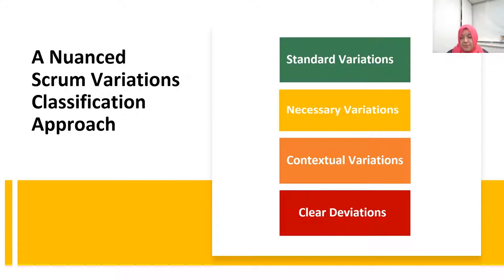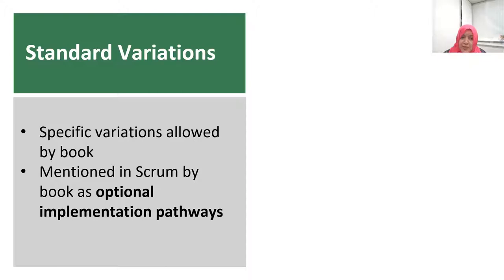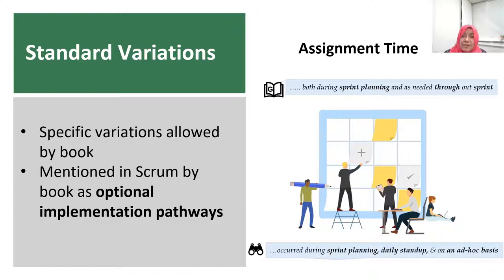Standard variations are specific variations allowed by the books, mentioned as optional implementation pathways. One example is task assignment time. The Scrum Guide states that work assignment can occur both during sprint planning and as needed throughout the sprint. In practice, assignment occurs during sprint planning meetings, daily stand-ups, and on an ad-hoc basis throughout the sprint.